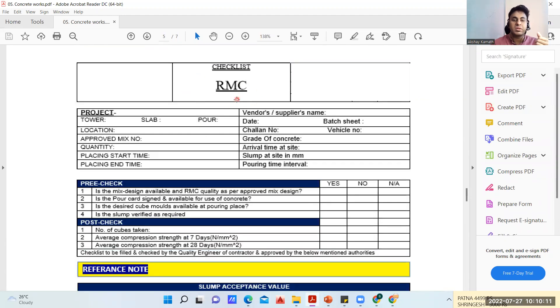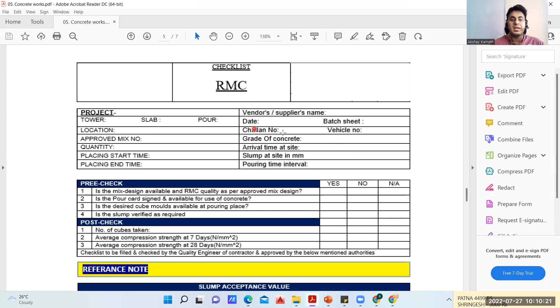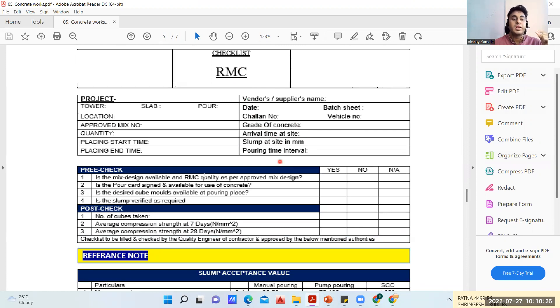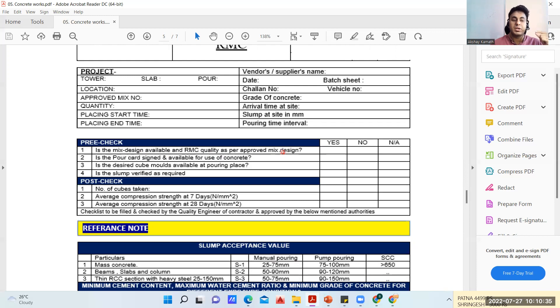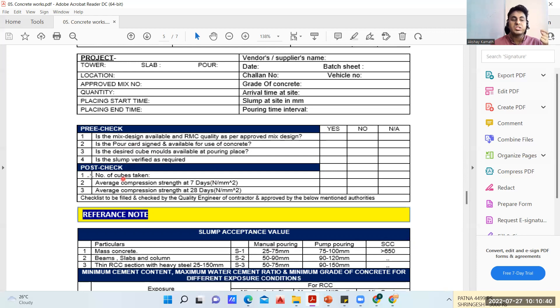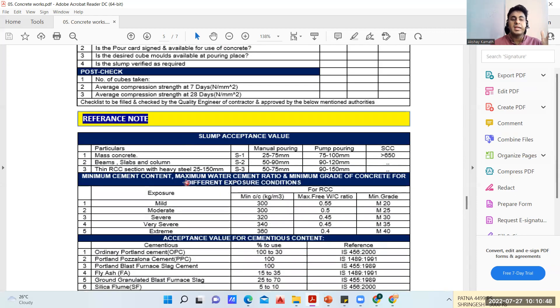For the RMC truck, whenever your transit mixer comes to the site, this is a checklist: date, challenge number, grade of concrete, at what time your transit mixer is coming, what is the slump you got. Pre-check: is the mix design available and RMC quality has the approved mix design - if you're done M30 grade of concrete, whether the same mix design is happening or not. Is the desired cube mold available at the pouring place, is the slump verified. How many cubes you have taken, what strength you got at the end of seven days, what compressive strength at 28 days.